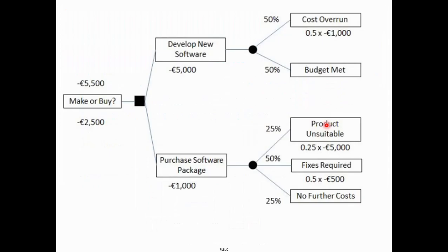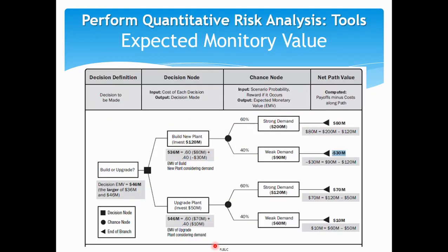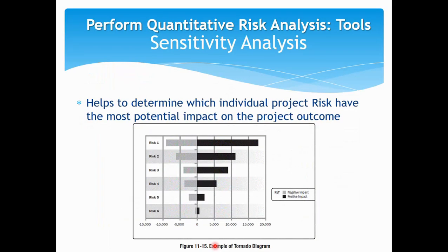Right. So one more technique in the slide deck was simulation. It is more statistical. You could refer to certain resources when you're free, such as Monte Carlo statistical methods. There are various statistical resources available to gather the correlation effects, how dependent activities are on the risks. Maybe you might have to take help from your research head or a statistical person in doing that. But why I concentrated on these two is that without any expert statistical knowledge, a decision tree can definitely be done by a project manager on a basic understanding, and obviously this sensitivity analysis is also no rocket science.